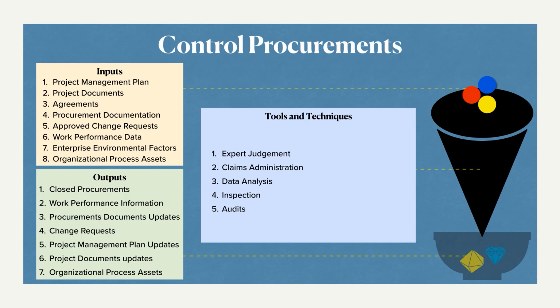If this gets worse, it can also go up to legal undertaking. Either the buyer or seller can seek support from the jurisdiction of that land, and it gets really worse. So to come a step down, instead of directly going to the legal jurisdiction, an emerging trend here is that both parties, buyer and seller, agree to some ADRs. ADRs are nothing but alternate dispute resolution.